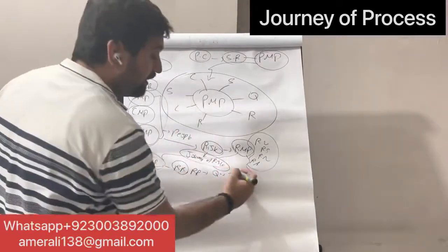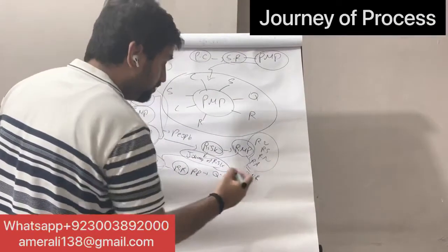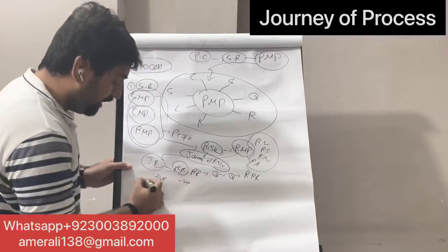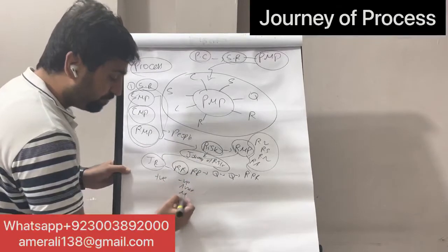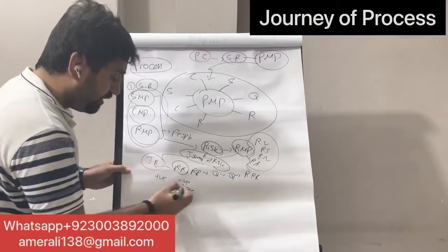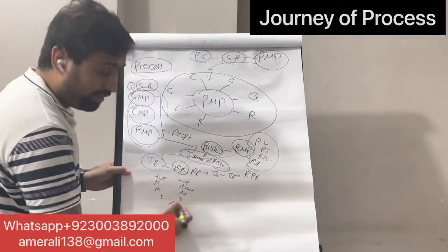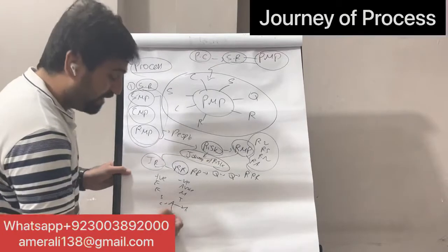Once that is done, you plan the risk response. You have positive risk, opportunity, and negative risk. The strategies for negative are avoid, mitigate, and transfer; for positive, exploit, enhance, share. Then you have active acceptance and passive acceptance, and then you have escalate.